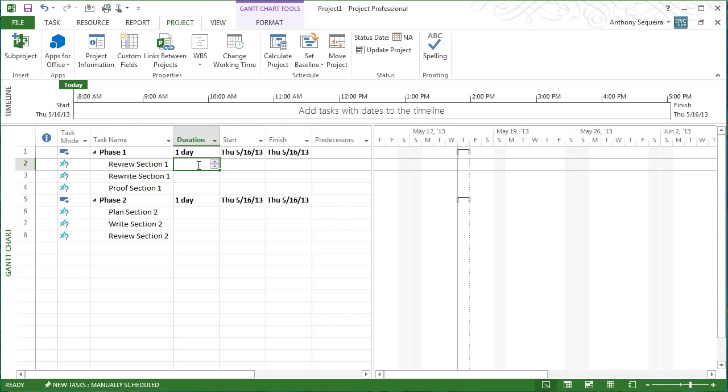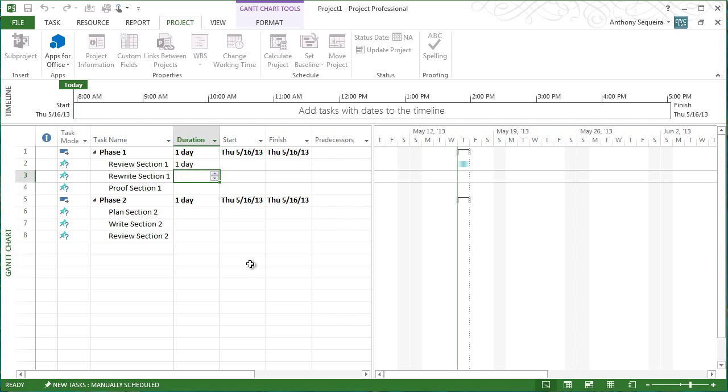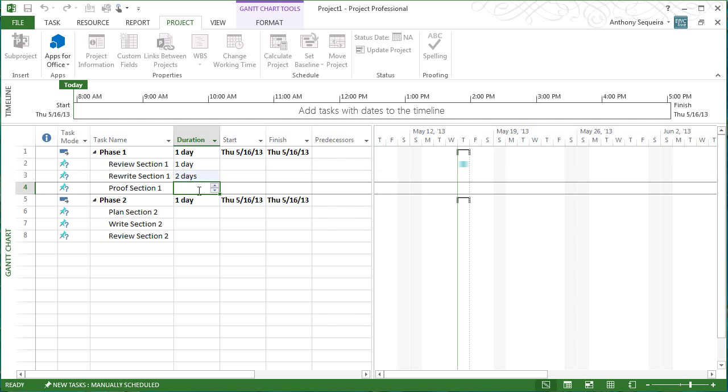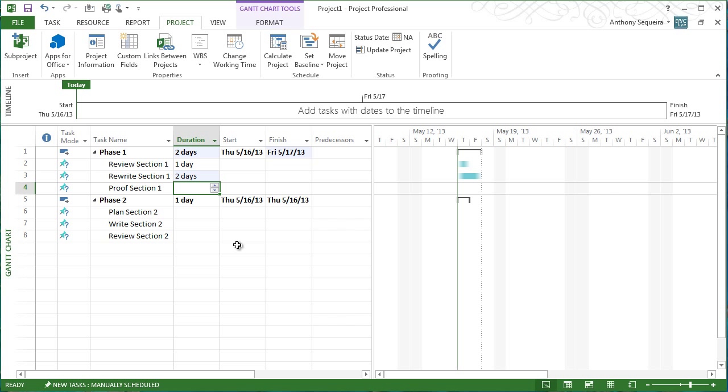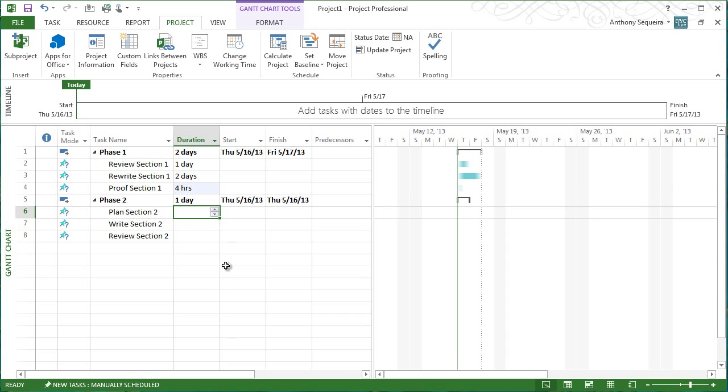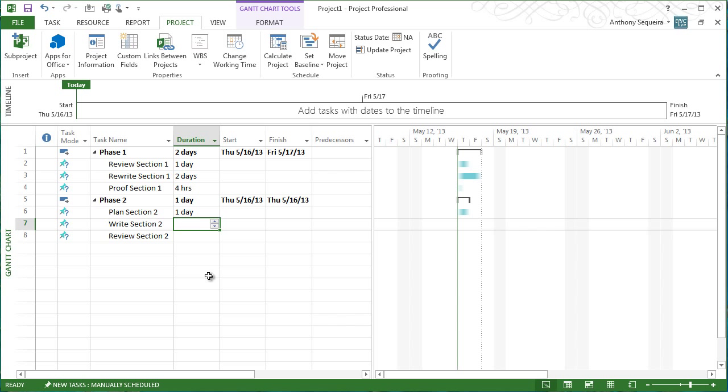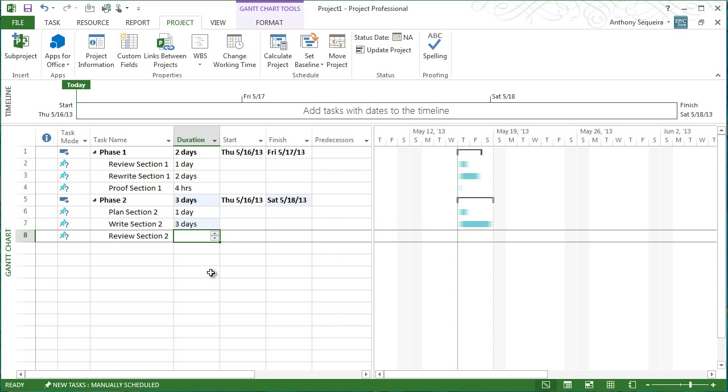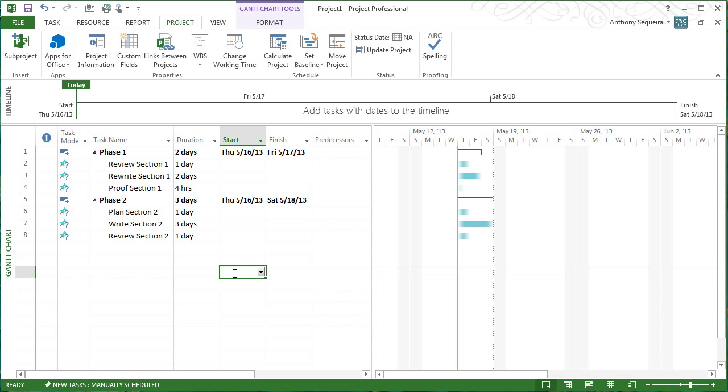For reviewing section one, well, I really think I can get that done in one day. So, I'm going to enter one day for that particular task. For rewriting section one, I think I can get that done in two days. For proofing section one, boy, I really think I can get that done in four hours. Planning section two, one day, writing section two, three days, and reviewing section two, one day. So, I've gone in and I've sketched out just how long I think each of these tasks is going to take me.